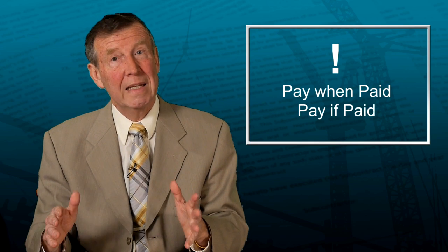One of the things that you have to recognize, based upon this paragraph 18 and also based upon the variable payment terms within the contract that we discussed under why we're doing this, is a basic issue called pay when paid or pay if paid.